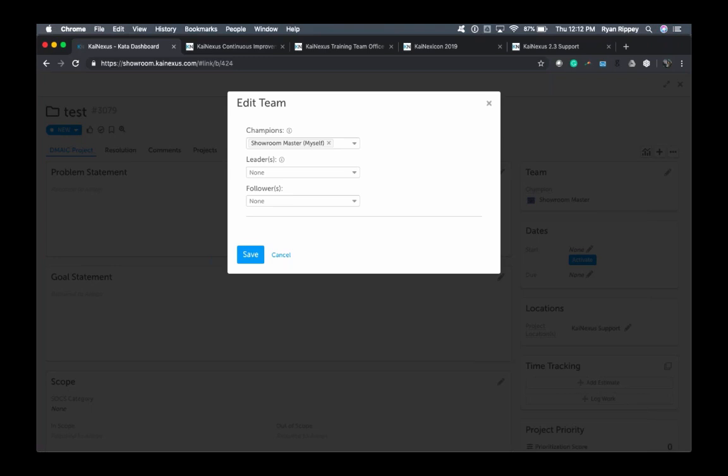Now, in terms of what team roles you'll be able to take away, for projects, you'll see that you can take away everything but facilitators and followers. So if you don't have a need for sponsors, leaders, participants, those can all come out. For improvements, incidents, and tasks, you can remove the collaborator team role. For charts, you won't be able to remove anything. Charts, of course, only have authors and followers, so those would stay the same. But this is something that if you want to take advantage of it, please reach out to your CE lead. We can set that up on the back end for you.